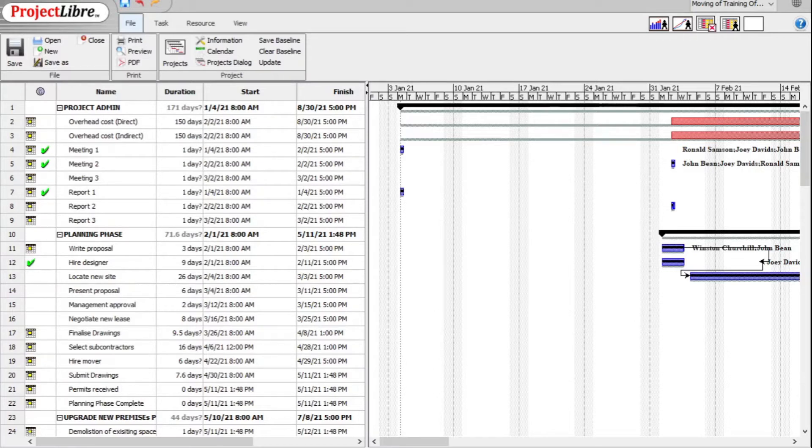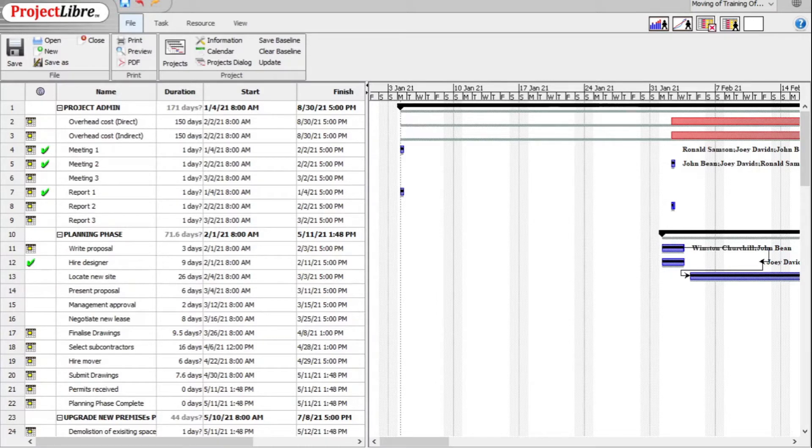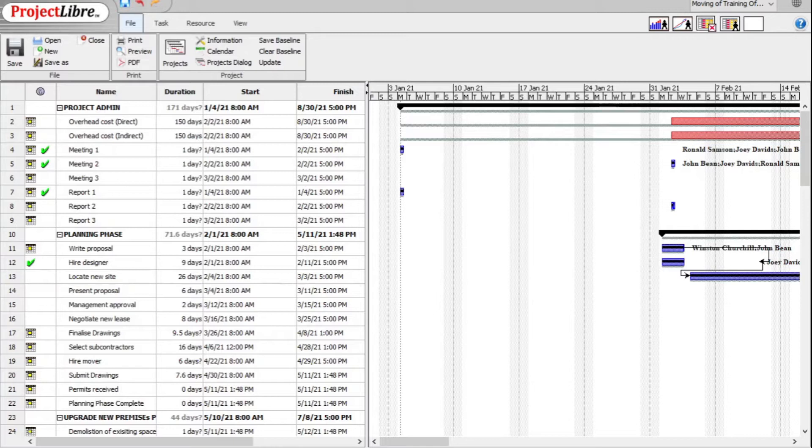You may have forgotten to set the baseline at the very start and at the later stage then you save it and then throw everything out so that you do not have correct financial data.